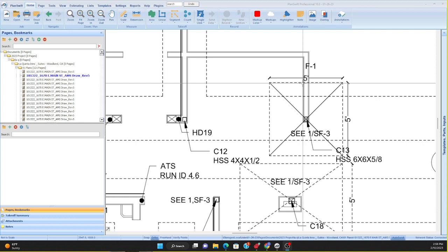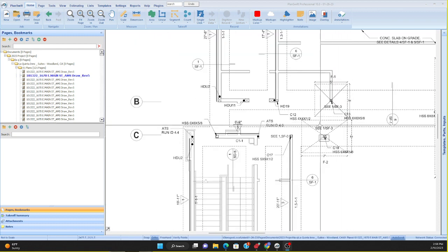Well, this is above that. So this is 100 and something percent. And so figure out the cost for 100%, and then you can easily figure out the cost for 100 and something percent. You could do it that way. For the columns, that's sometimes how I do that.